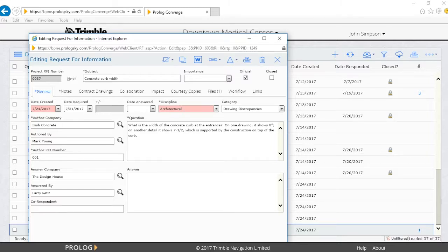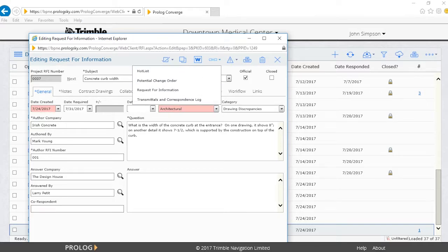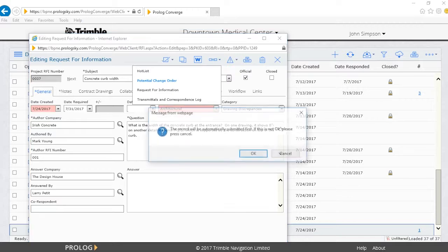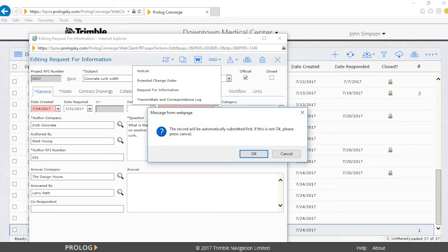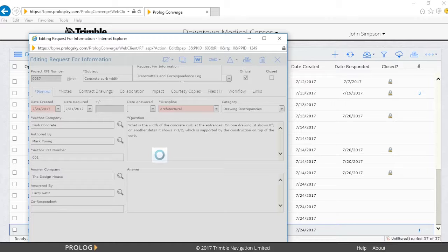To do this, we need to initiate a potential change order, or PCO. From the RFI screen, we can click on the Links button and initiate a PCO. A pop-up message will appear, and after we click OK, it will save and submit the RFI, and the new PCO will be created.